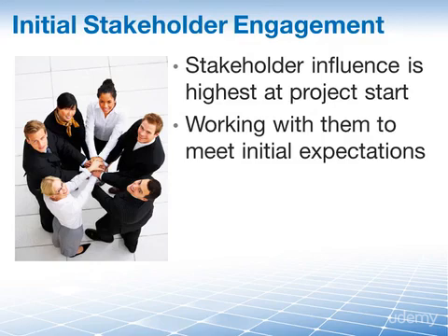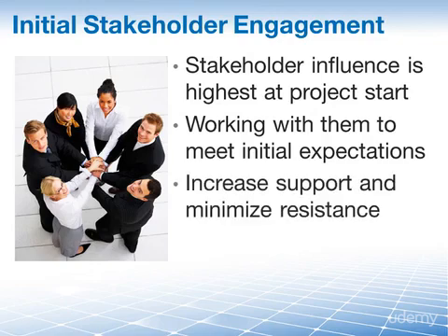The goals of initial stakeholder engagement activities are to increase support and minimize resistance from stakeholders, to develop and communicate realistic expectations for the product and project, and to bring out into the open any initial issues or concerns that your stakeholders may have at the beginning of the project. This is so that plans can be created to resolve these issues and address these concerns very early on.